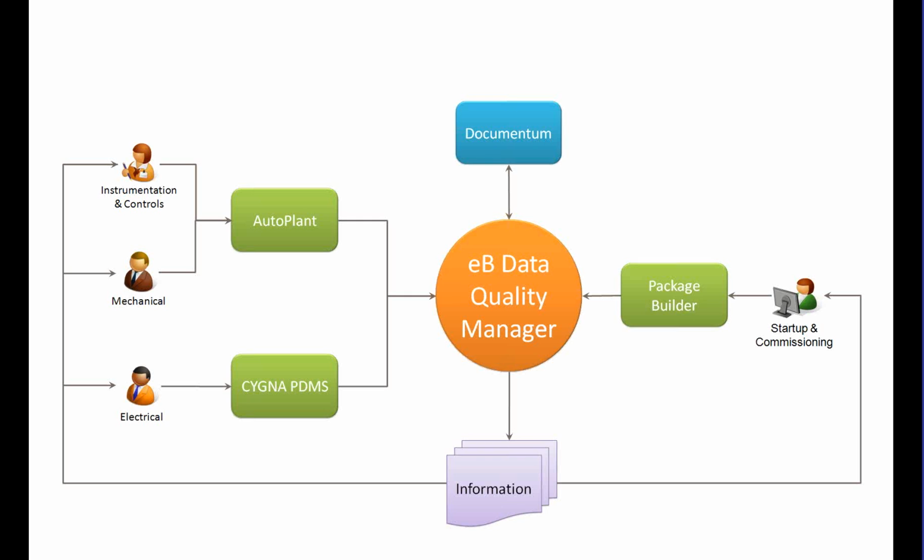And the problem is that the sequencing was given to them in the form of PNIDs. Circuits do not appear on PNIDs. Instrumentation and equipment that requires cabling appears on a PNID. So they would have to extrapolate from a physical drawing that's in their hand. They'd have to look at the equipment and then find the associated circuit and then assign the package to it.